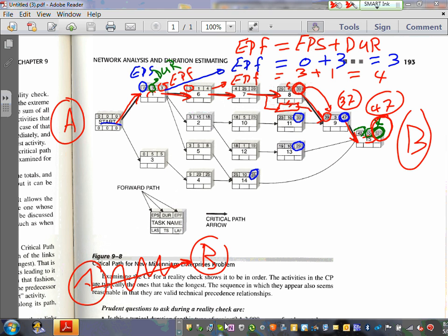You do not want to go more than 50 weeks because you get penalized, right? You go to the general contractor, they give you 4 months to finish, guys, and a date to deliver a finished product. And you tell them, well, I can't finish it, what's going to happen? They give you a penalty, or next time we will not hire you on the project. Unless there's something, well, we have a hurricane, or you know what I mean.